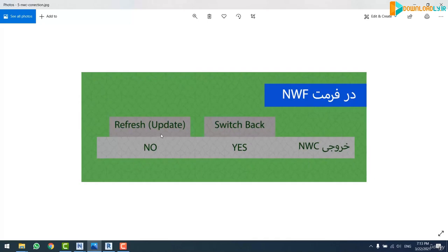So let us have a review of our findings. Basically, while we are carrying out our project in Navis, we import our Revit file into Navis directly by click and drag, since if we export it as NWC type, we won't be able to refresh it. But as I mentioned before, in heavy projects, we are forced to export our file in NWC type, since if we import it directly, Navis would import the Revit file and also create the NWC file types simultaneously. In this process you may face difficulties.